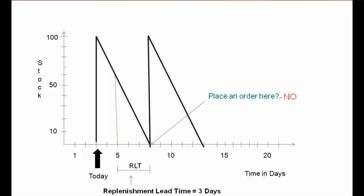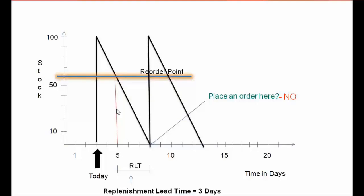Second thing we need to know is that is why we need to place the order three days before. And another thing we can set up is that whenever the stock is 60 pieces, then we should be placing an order. So as soon as the stock will reach 60 pieces, as you can see in the graph, we need to place an order. And if it is taking three days, then we will be safe. After three days, the stock will arrive and we can again fulfill the stock. So there will be never any shortage. So that is the concept of reorder point, how the reorder point works in general.